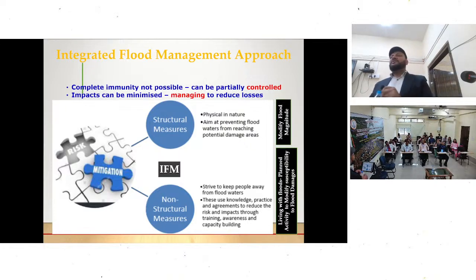No. Actually, what we do is plan for the minimum cost, because funds are limited. This has been done in the national highways. Now in NH, they have to maintain the road for 5 years. The defect liability period is 5 years, but in flood works we are taking only 1 year.